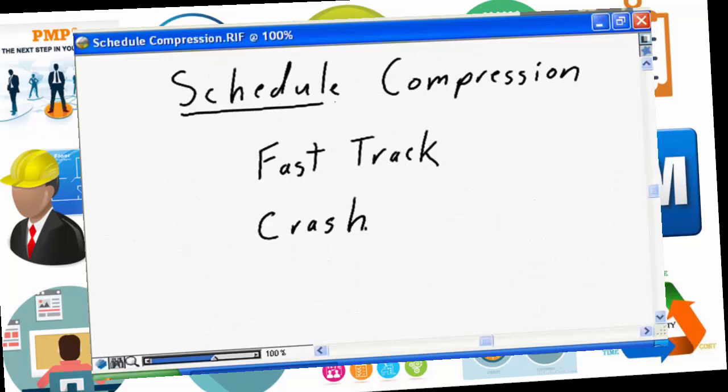As a result of the work you did during project control, as a result of tracking the actuals and entering the revised ETCs, it's entirely possible that your project is forecasting a later finish date than originally planned. It's time to start to look at what techniques we can apply to compress the schedule. It's time to start looking at what techniques we can apply to try to improve the project end date. These compression techniques can be categorized as fast tracking and crashing.